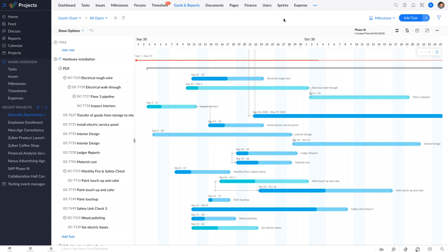The position and the length of the bar reflects the start date, duration, and the end date of all the activities. This allows you to view at a glance what the various activities are, when each activity is scheduled to begin and end, how long each activity is scheduled to last, where activities overlap with other activities and by how much, and the start and the end dates of the whole project. The red bars here represent milestones, the gray ones represent task lists, and the blue and green ones represent your tasks and subtasks respectively. And these black lines are the dependencies.